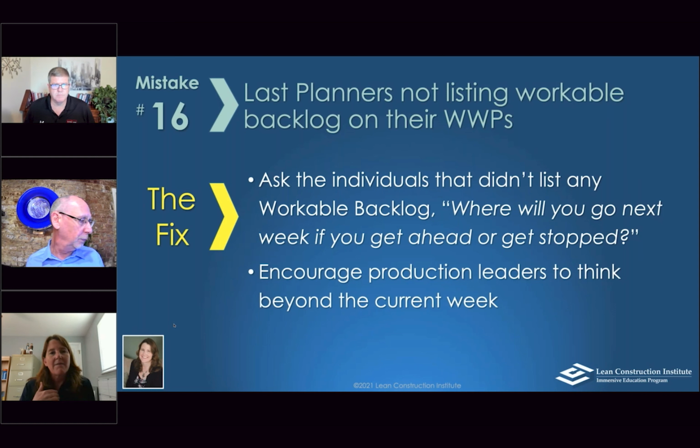The point is being ready, knowing work that isn't critical and isn't on the weekly work plan, but can be done to continue to advance the work and to keep the teams busy and productive is key. So we want to be asking everybody at the meeting, what are you going to do if you get stopped and you can't do work?